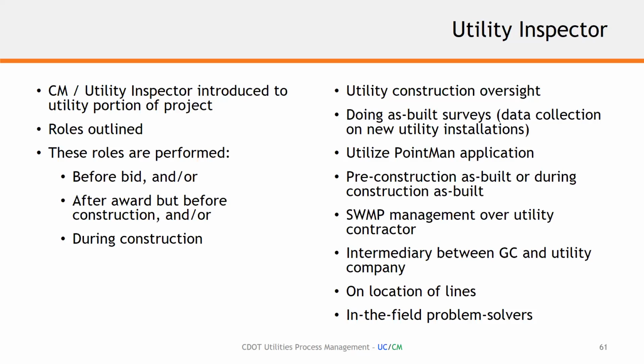Sometimes they stay on after award and help with construction and during construction, which is important to support the construction as a whole and be there as that go-between the general contractor and the utility company. They're also very involved in, again, the construction oversight, the as-built surveys that go on either early relocations or during construction, but the oversight of ensuring that those as-builts are complete and documented during the installation of the utilities is extremely important.